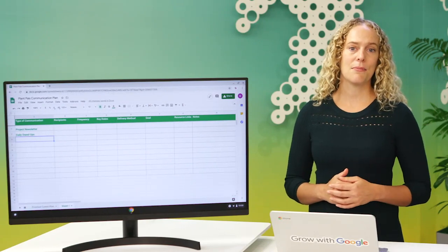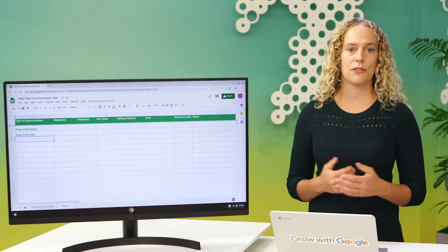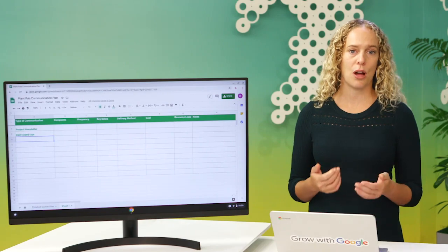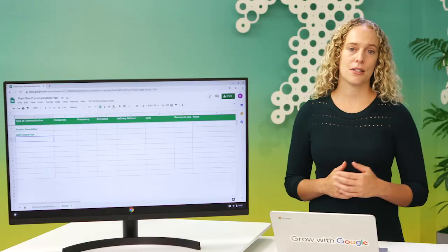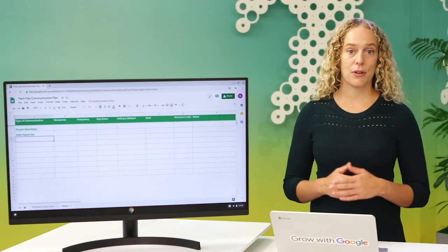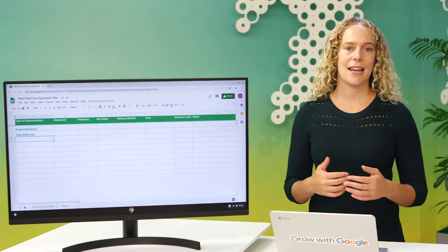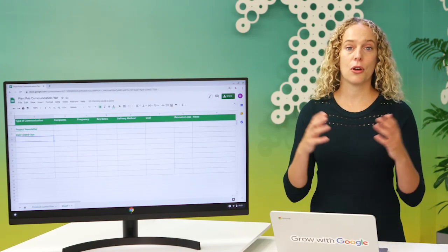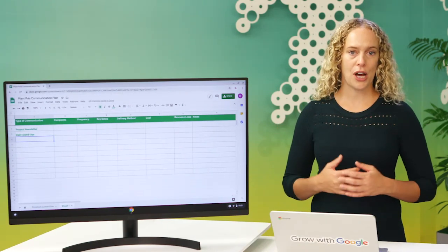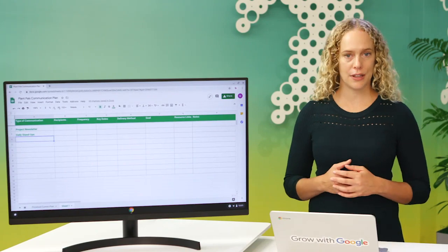But sometimes, daily meetings aren't possible for given time zone restrictions or other obligations. Don't worry, there are other ways to keep communication flowing. For example, the project team that created this program had daily email status updates for the whole team to report which action items were being worked on for the day. They also used a project tracker for tasks and milestones to make sure everyone's on the same page.